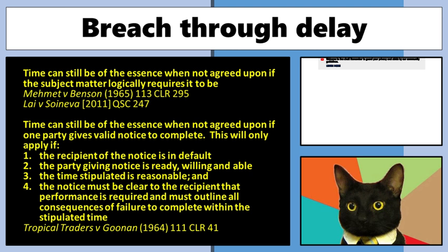For example, if we have a contract to build a viewing platform for the coronation of the, well, I presume it'll be a king next time, and we don't explicitly say that time is of the essence, but there's a point in time when the coronation is going to happen. Just by sheer force of logic, it has to be. It's kind of like a factual analysis, but sometimes it's just by definition going to be a requirement of that contract.